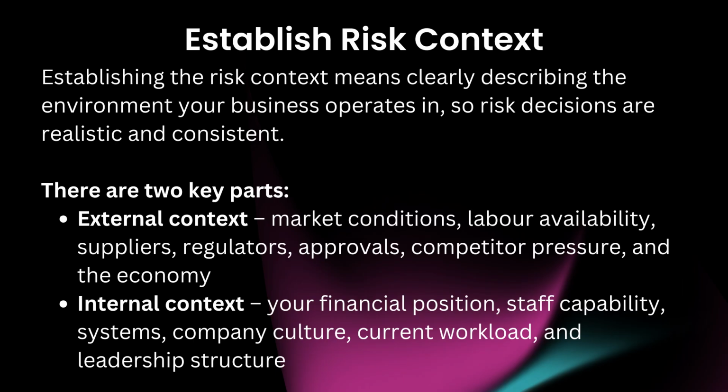Establishing the risk context means clearly describing the environment your business operates in, so risk decisions are realistic and consistent. There are two key parts: external context, which covers market conditions, labour availability, suppliers, regulators, approvals, competitor pressure, and the economy; and internal context, which covers your financial position, staff capability, systems, company culture, current workload, and leadership structure.